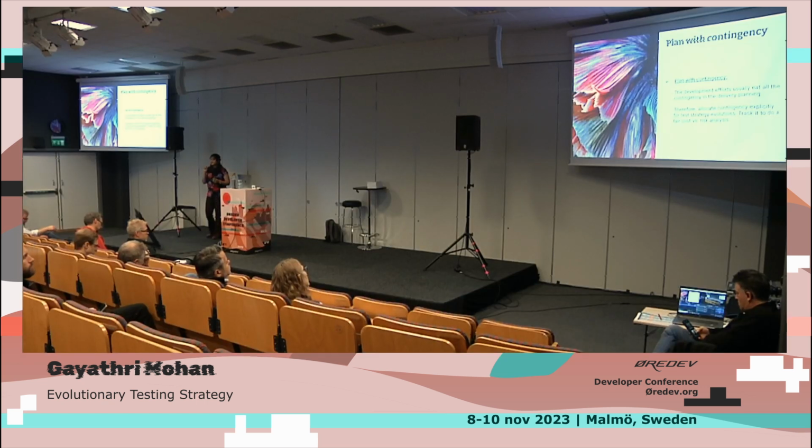What happens usually is the delivery plan will have contingency, but the development effort consumes all of it, right? It eats up everything. Oh no, there's a defect, I need more time. The contingency is never getting allocated to the testing side of things. So having that small contingency for testing called out earlier, and whether you end up using it or not is another thing. Just having that small proportion just for testing, not as a broad bucket for the whole project, because it gets eaten up by the development effort itself most of the time.